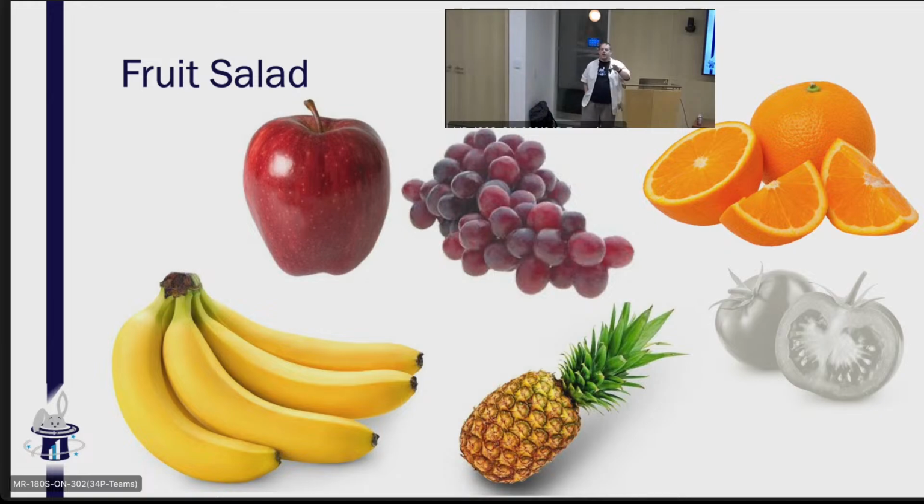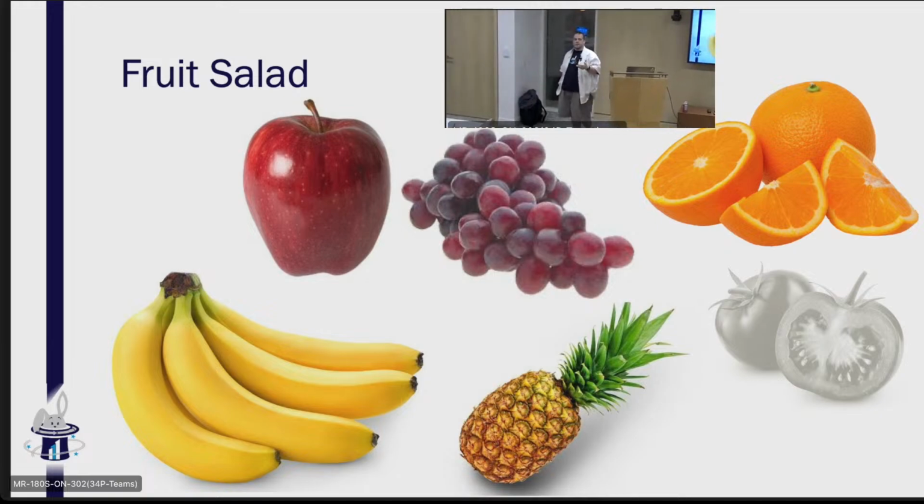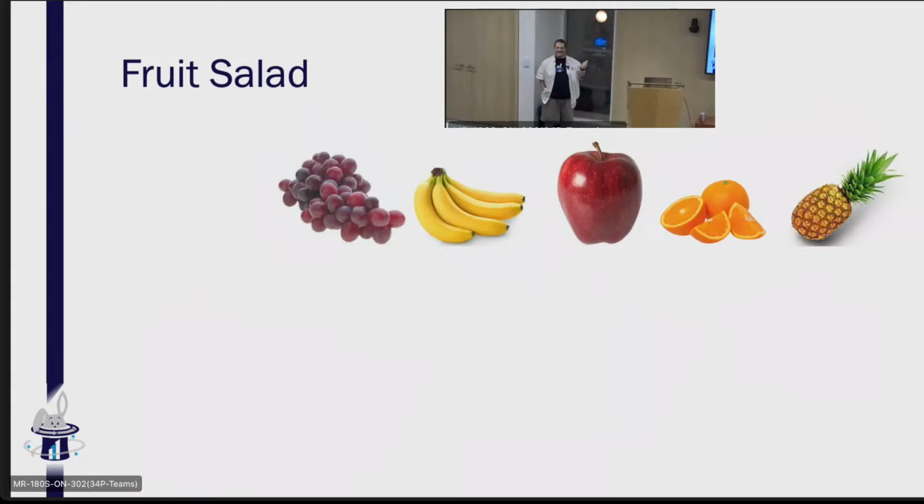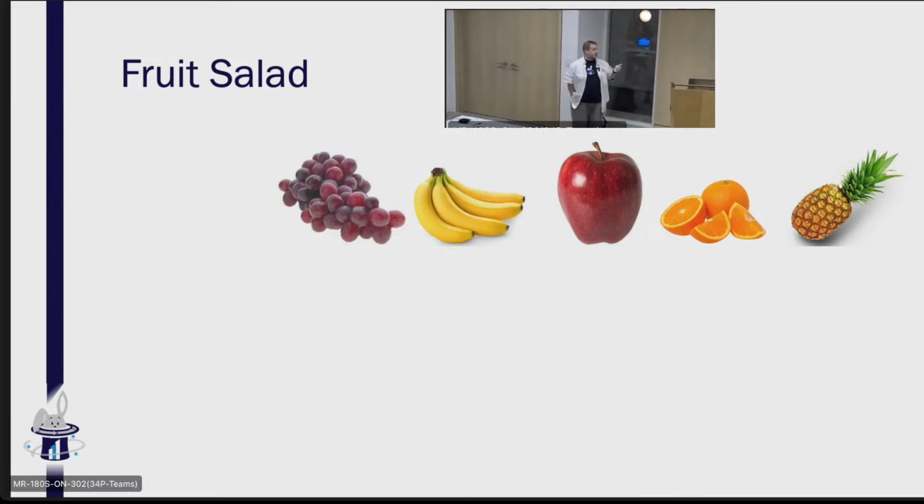The entire point of having this estimation is for us to come up to that shared understanding. Now, because this is my presentation and my game, I've come up with the right answer. The right answer is that grapes are the easiest because I don't need them peeled and cut into thirds. Apples kind of come next because they do require a knife to cut them, as does a banana, which also needs to be peeled. The banana doesn't have the same risk because it doesn't have to be a sharp knife. And so not only am I factoring in the level of effort, but I'm also factoring in the amount of risk that's involved in doing it.